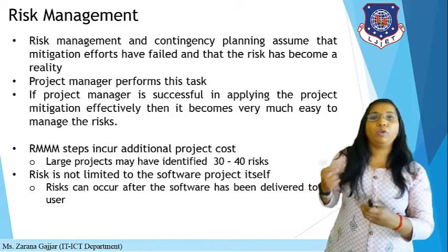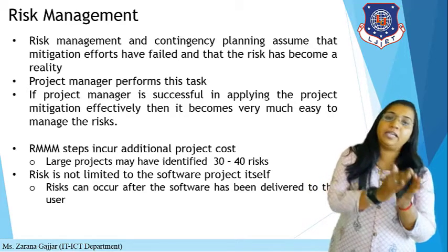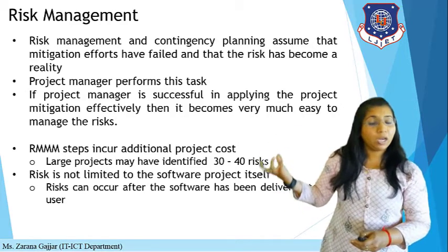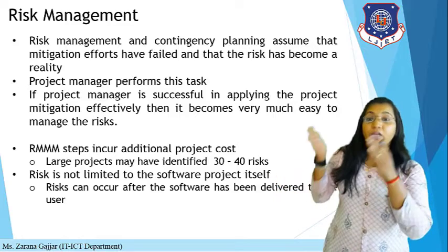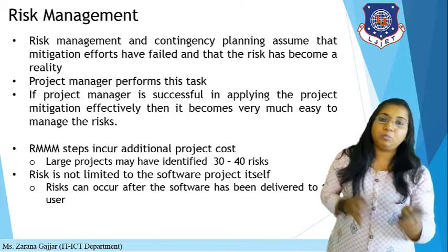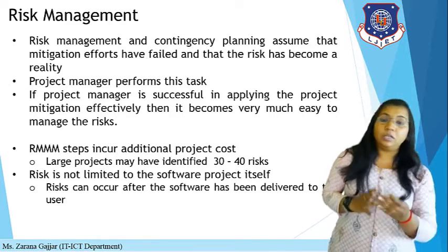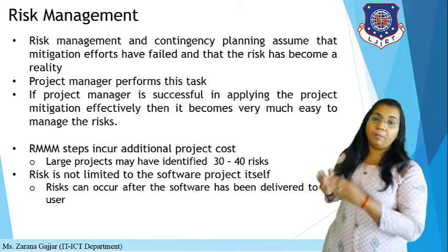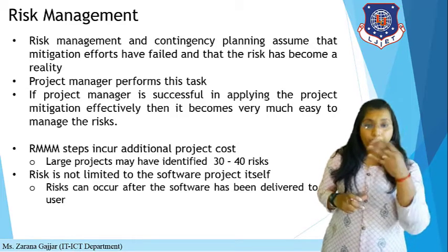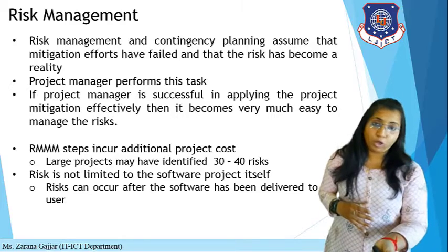So we have learned about RMMM, that is risk mitigation, risk monitoring and risk management. In risk mitigation you are avoiding the particular risk. In risk monitoring, you are tracking the particular risk. And in risk management, now the risk is a reality, so you have to manage that particular risk. So this is about RMMM. RMMM steps incur additional project cost. If you are applying this RMMM strategy, then it also leads to an increase in your cost